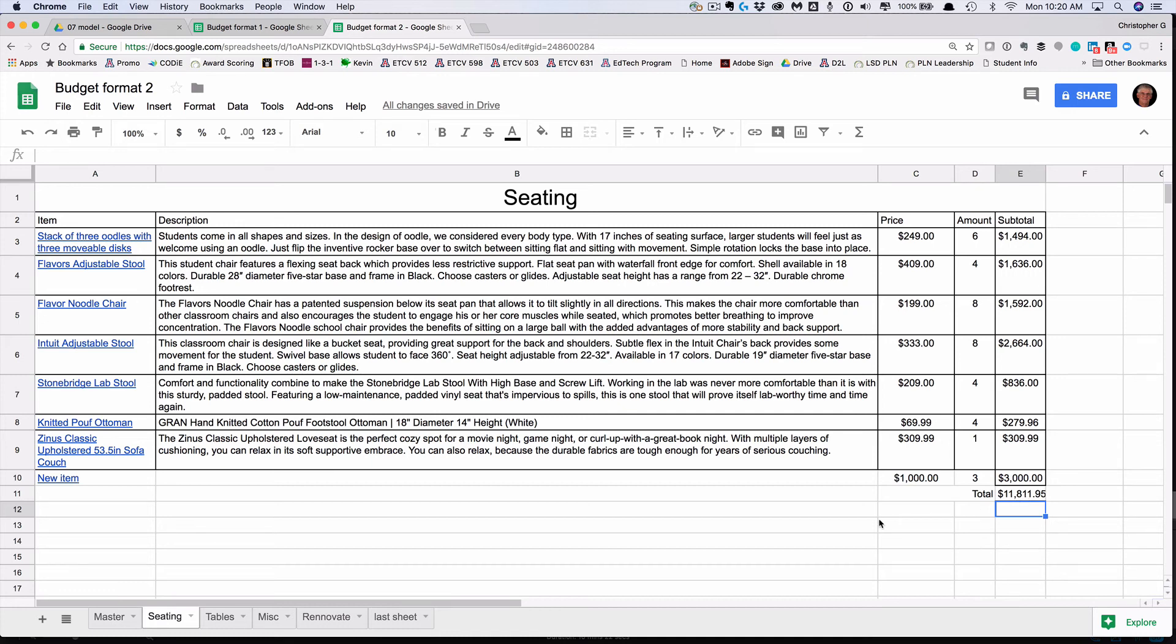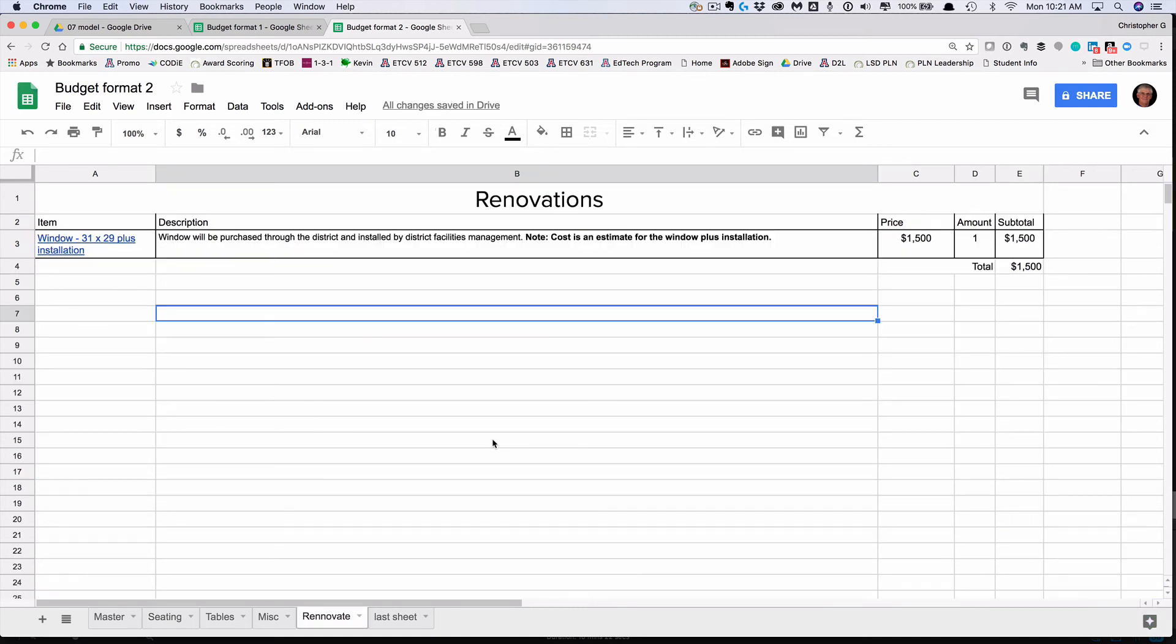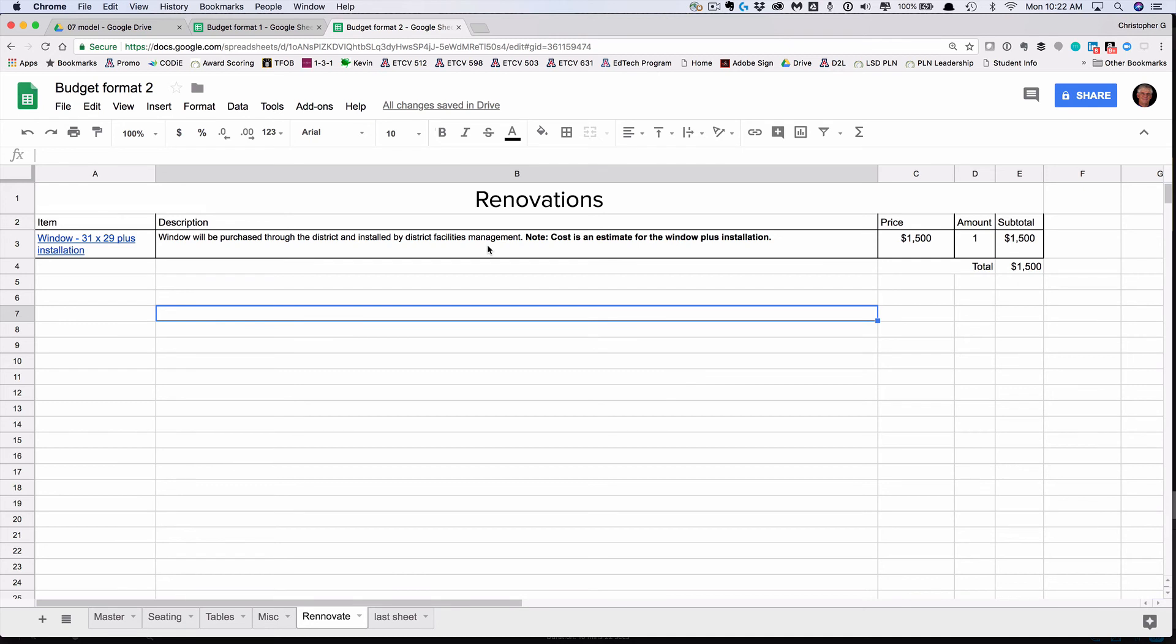So those are the two formats for the different types of sheets. Now, one last item, no matter what format you do. For the renovations, they want to put in a window. I found one at Home Depot that's 31 by 29 inches. So we want to purchase this window and install it. The window will be purchased through the district and installed by district facilities management. I'm going to make a cost estimate that this is going to be about $1,500. If you're not sure what a good cost estimate might be on an item, just direct message me and I'll be happy to give you a number.